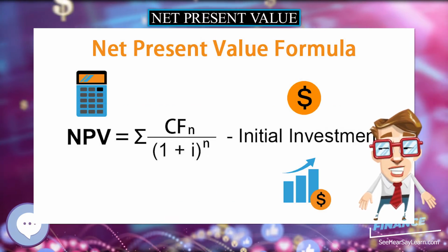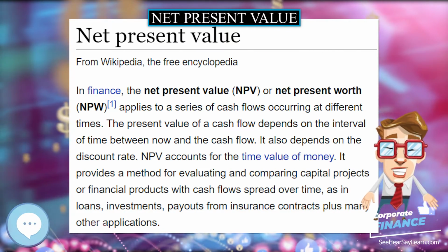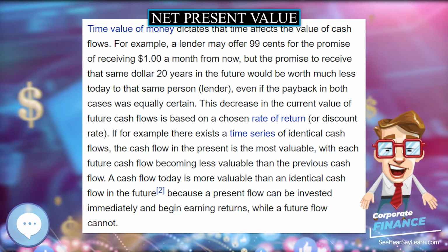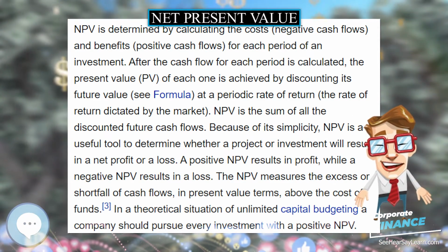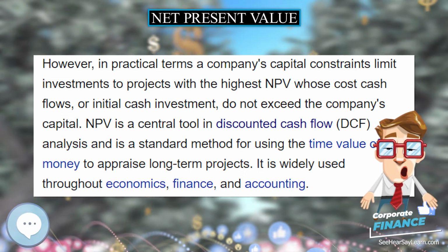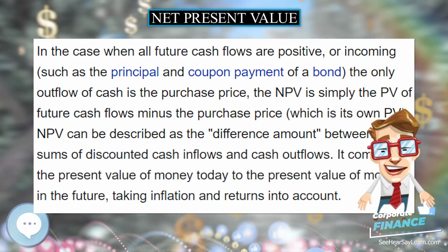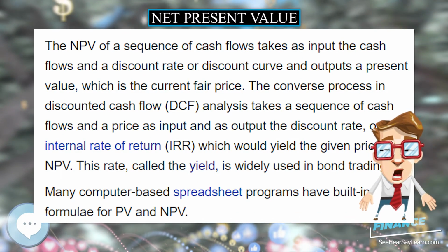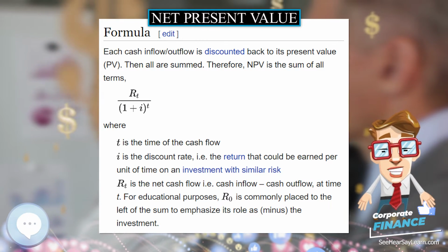An investment with a positive NPV is profitable, but one with a negative NPV will not necessarily result in a net loss. It is just that the internal rate of return of the project falls below the required rate of return. An alternative way of looking at net present value is that at the given rate of cost of capital, whether the project can meet the cost of capital. For example, if the NPV is minus $2.5 million, i.e. negative NPV, for a given project, it may mean that at the given weighted average cost of capital, WACC, the project fails to meet the expectations of the suppliers of capital for the project.